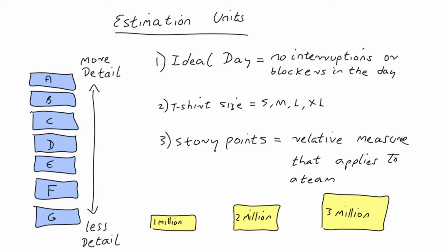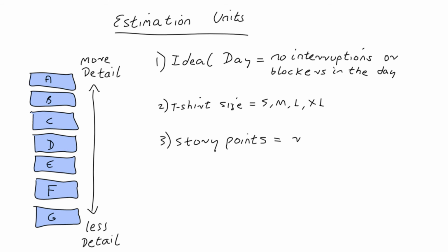And because story points represent the effort to develop a story, a team's estimate has to consider everything that can affect that effort. And that includes the amount of work to do, the complexity of the work, and any risk or uncertainty when doing the work. So in summary, a story point is simply a function of volume, risk, and complexity of the story.